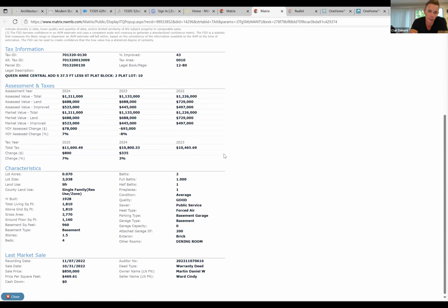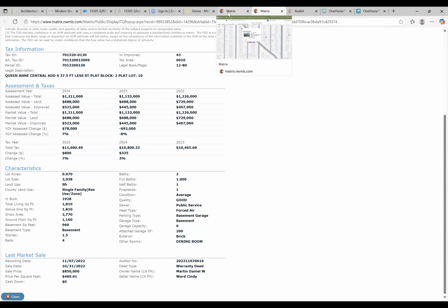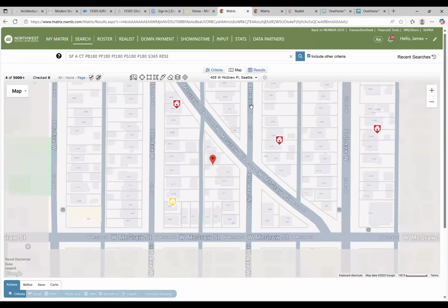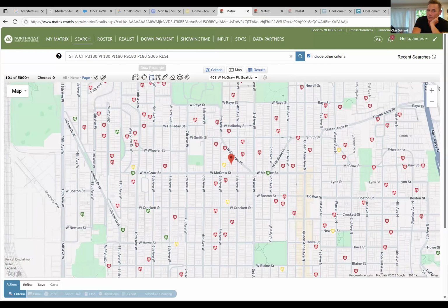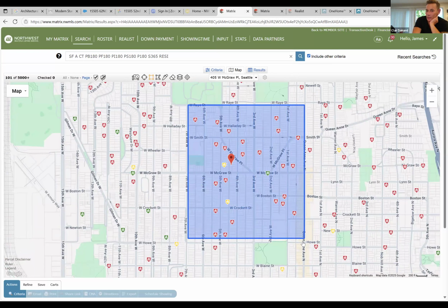3,000 square feet, 2,700 square feet with a garage. So I would say on your rehab, it's probably a little light. Think so? So maybe 300 with that brick. I would say excluding the brick alone. So the 250, typically when I'm talking about 250, that's usually around $110 a square foot. But you're at 2,700 gross, so that's gonna be more like 270 in there. And with the tuck pointing, it depends on how bad it is, you're gonna be 300-ish on the house.